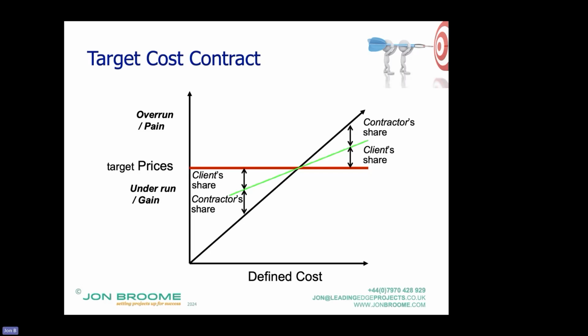Okay. So that, and also just think about it in transfer of risk. If I am capping that here, then the contractor goes, well, I've got all the downside of a price-based contract. If my costs exceed my prices, I'm losing money. But any upside, I'm splitting with you. So I have asymmetric risk. So the net result is a contractor would actually say, I'm going to have a higher target prices than a price-based contract. Because heads I lose, tails I split the gains. All right. So think about that in terms of risk allocation.